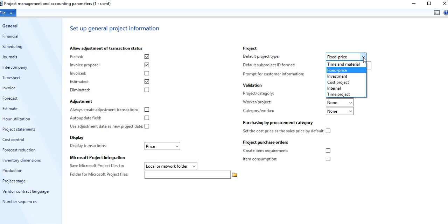But at the same time, to have a continued inflow of the revenue, the end product or the desired result of the project is broken down into multiple milestones, so that proportionate to the milestone achieved, they can raise the invoice to the customer. So in this case, the revenue is fixed. Revenue out of the project is fixed for the company which is conducting the project.